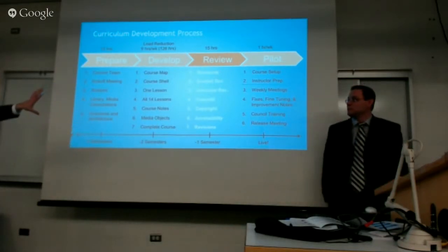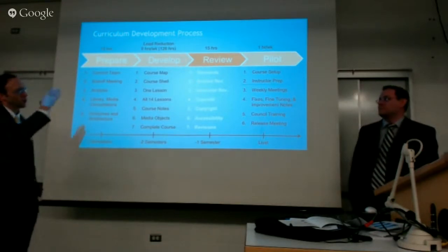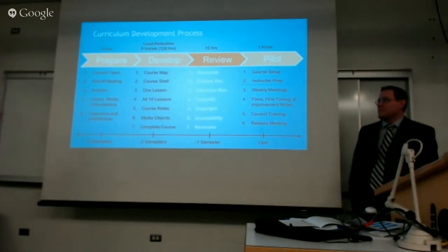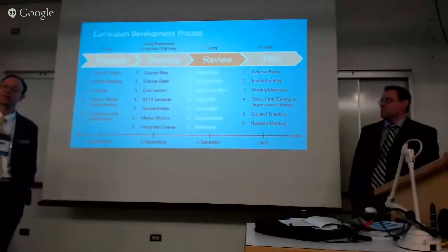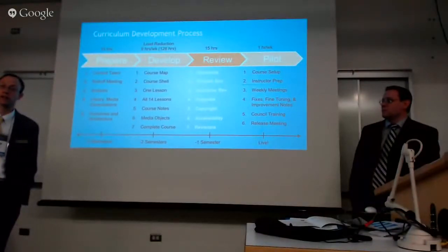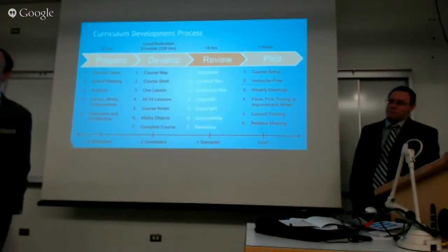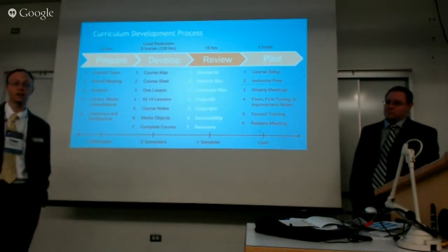Okay, so we're hitting review semester, and I'll just point out on this one, we review the course for several different things, and it starts out with standards review, but we also want to include product testing, both from the student perspective, how's this course going to run when a student's actually in it, as well as from the instructor perspective. And I'm going to just be as transparent as we can here.